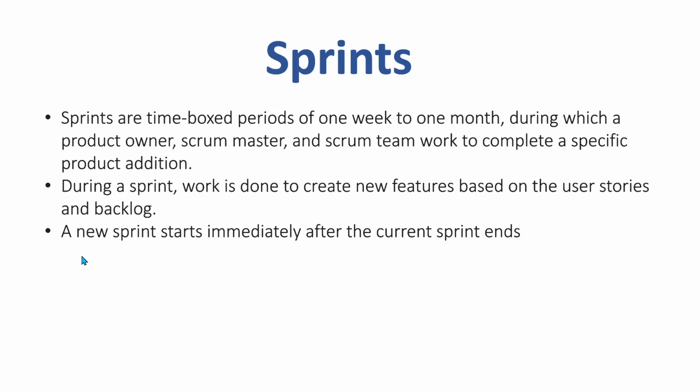All right. So what are the different ceremonies within a sprint? Generally in Agile, you will have a sprint planning on day one of the sprint. In the sprint planning session, you sit with various project stakeholders. You will try to estimate the amount of work that can be accommodated within the sprint. You will have a sprint goal and you will work towards that sprint goal.